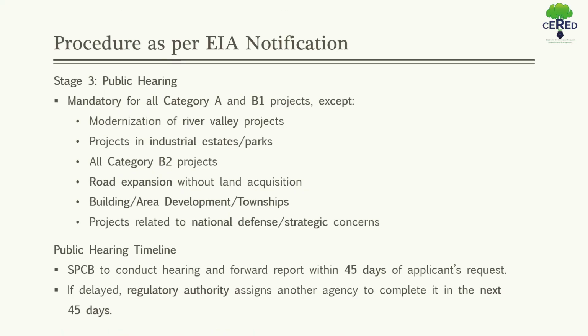Now, public hearing is not a simple or one-part step of EIA. It is very essential for doing any installation of a project, for both the proponent and the committee. Public hearing shall be conducted by the SPCB, the State Pollution Control Board, and the proceedings shall be forwarded to the regulatory authority within 45 days of request from the applicant.